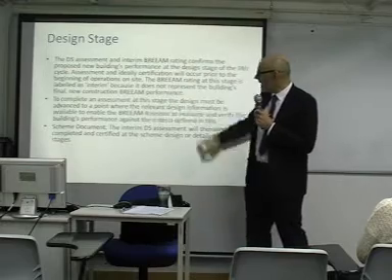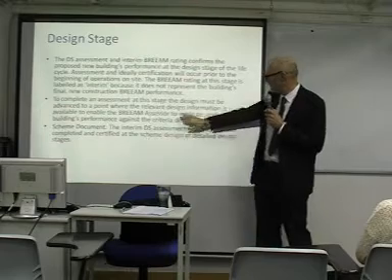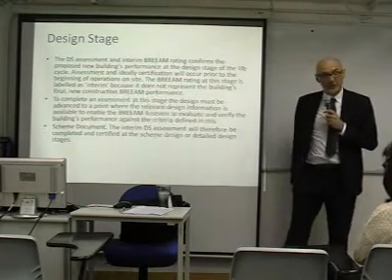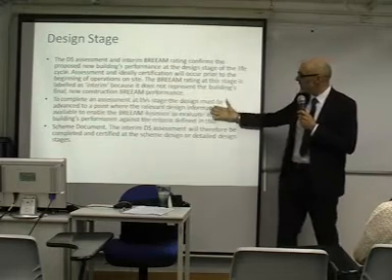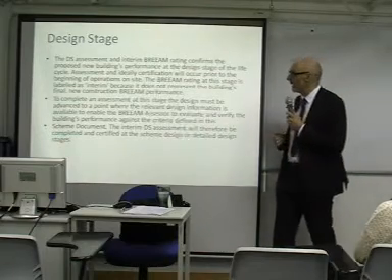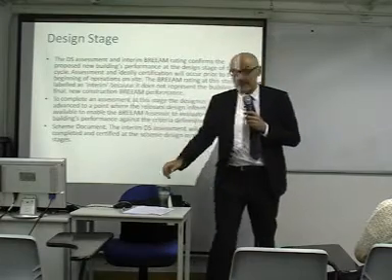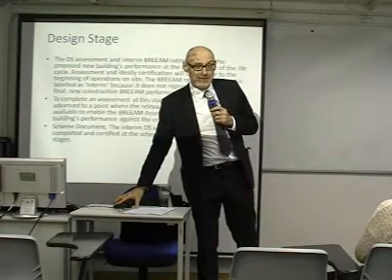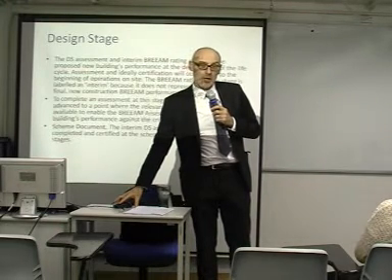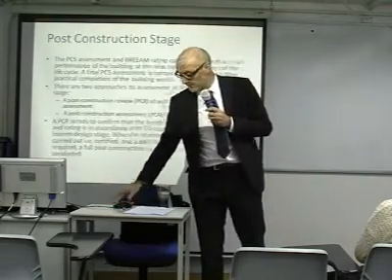So in order to complete an assessment, design must need to be at a point where the relevant design information is available to the assessor to make an evaluation. That's based on a scheme document which is then completed and reviewed. So getting through design stage is onerous. It means that the assessor is working alongside the design team, and there is an important part of ensuring design as any other member of that team, although they are independent assessors. What it means is that designs are verified, specifications in place, and you're actually certifying or proving the components you're going to use in the building are actually used on site.